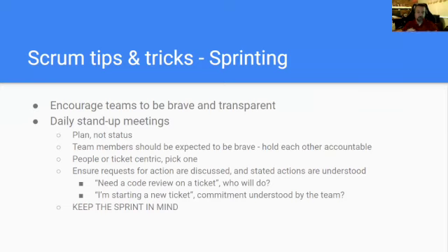The challenge with doing it either people-centric or ticket-centric, and 99% of people are going to do it people-centric, is what if a team comes to a stand-up, there's 4 people on the Scrum team, they all say what they're going to do, and nobody talks about the ticket that is almost ready for the product owner to accept? Nobody's touching it, nobody's working on it. That's still probably the most valuable thing for the team to focus on.